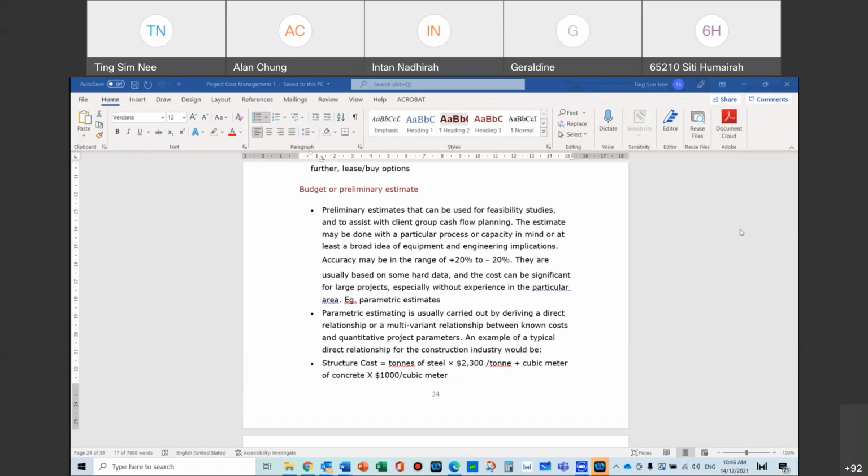Again, for the rate itself, there are two ways you can get it: from past historical data, or you can work out a simple calculation of rates, which I mentioned to Zai, I think, or somebody like that the other day. It will be a combined simple calculation of an all-up rate, which is a combo of manpower rate, machinery rate, and also material rate.